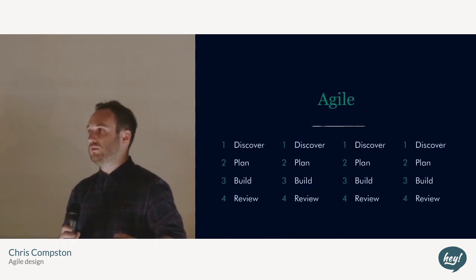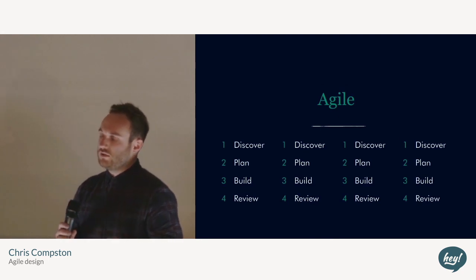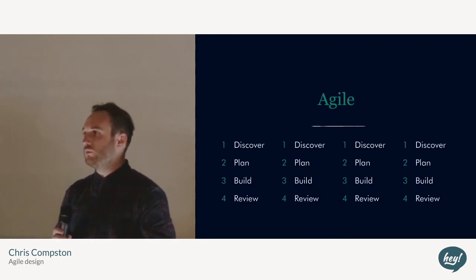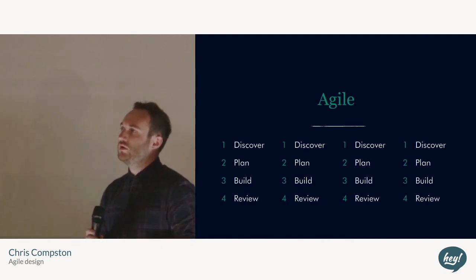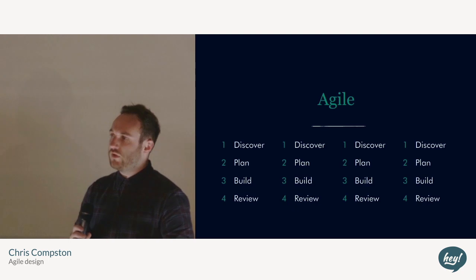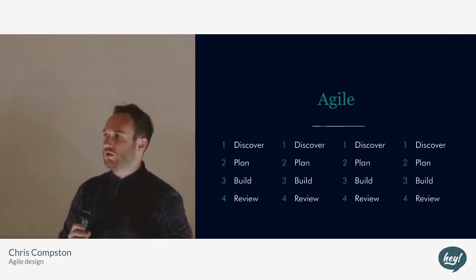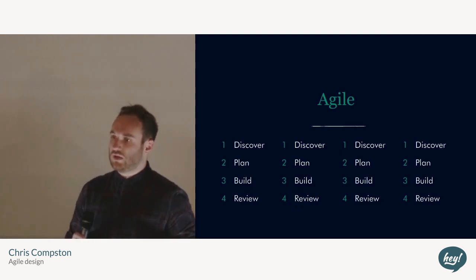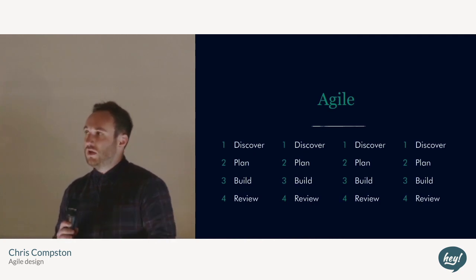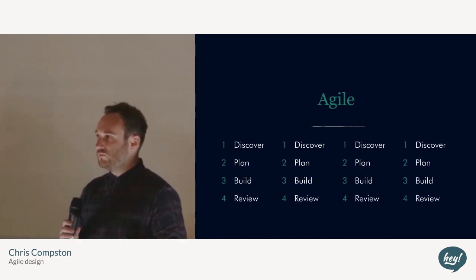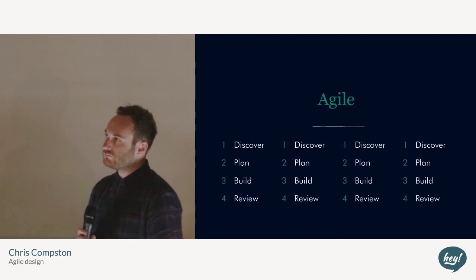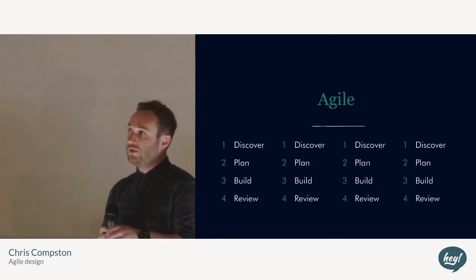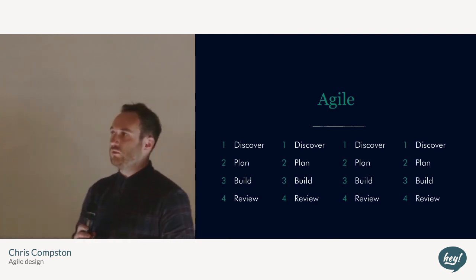Agile could be described in this way, where you take smaller slots that are probably a week to 3 weeks long, and you go through the process every time. So you go through the discovery, the research, you do a bit of planning, design, build, and review. And after 2 weeks, you go back to the stakeholders or the client and say, this is what we've built so far, are we on the right lines? And they either go no, in which case you've wasted 2 to 3 weeks, not 2 years, or they go, yeah, you're on the right lines, carry on, and then you carry on going through the process. So you can already see how it fits within design in general and, in particular, web design and development.